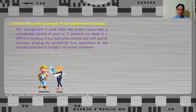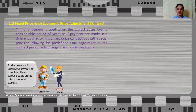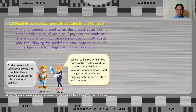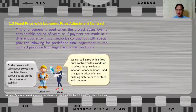For example, the contractor says that as the project will take about 10 years to complete, there is serious doubt about future economic stability. So the client proposes: we can still agree on a fixed price contract with a condition to adjust the price due to inflation, labor conditions, and changes in prices of major building materials such as steel and concrete. The adjustment items are predefined in the contract.